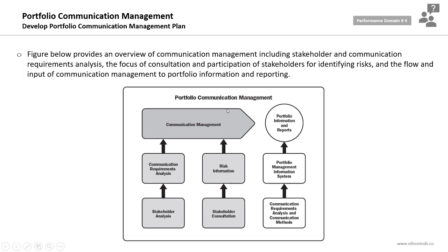So by looking at this figure of the communication management, you will see that we will start with conducting stakeholder analysis to determine who are the stakeholders and what are their communication requirements. And then we will conduct the communication requirement analysis to determine their preferred communication methods and frequency. And this will serve as a strong input to the communication management of the portfolio.